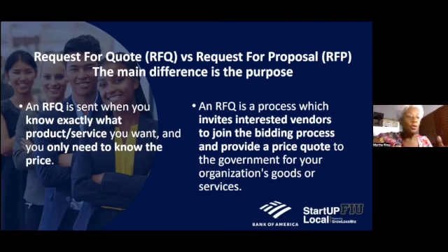By June 2024, or even close to September 2024, usually you start the process now, unless it's an RFQ or simplified. But anything requiring a process to vet the company and get everybody, we have to start a minimum of 9 months prior to when you actually need the service. So any questions?